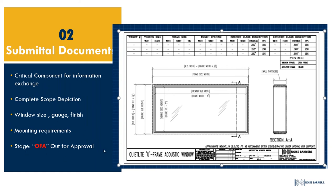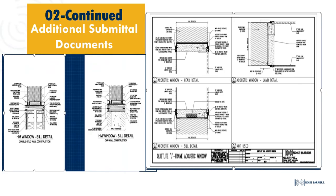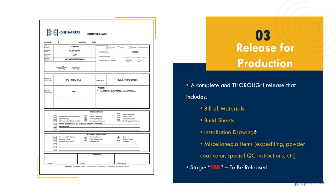The submittal is then sent out for approval. Additional submittal documents you'll receive with the window package include sill details describing the installation context — stud wall, drywall, attachment points. Glass thickness and wall thickness are critical and should be verified in the field, because once the window is made, you can't shrink it. These are things we want to address early, make changes as we go, and ensure the drafter has everything needed.